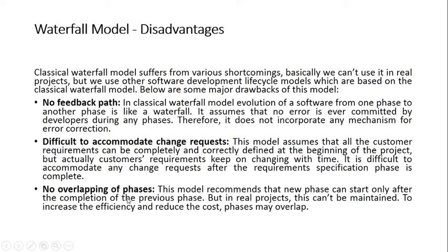Then no overlapping of phases. Once a phase is completed, only then can you start with the next phase. You cannot start the activities in parallel. Say time is short, so you could ask your team members to work in parallel. That is not possible in this model. The model recommends that a new phase can start only after the completion of the previous phase, but in a real project this can't be maintained. To increase the efficiency and reduce the cost, phases may overlap.